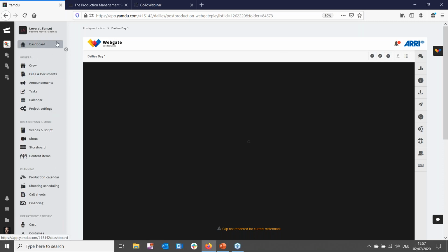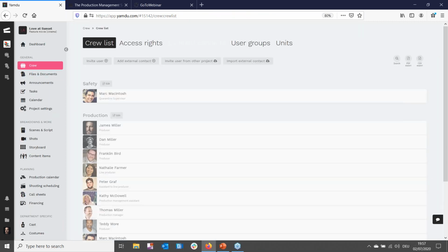Okay, great. All right, couple more. For the task function, can you create a template of tasks that could be used for each new project? Yes, so you can reuse tasks, you can use the same tasks. So again, for example, if on the first project there are 10 things that you need to do for that project and on all subsequent projects, then you can reuse that by creating a template for that project, and those tasks will appear as they did previously. All you need to do is just update who's involved and what the deadlines are.